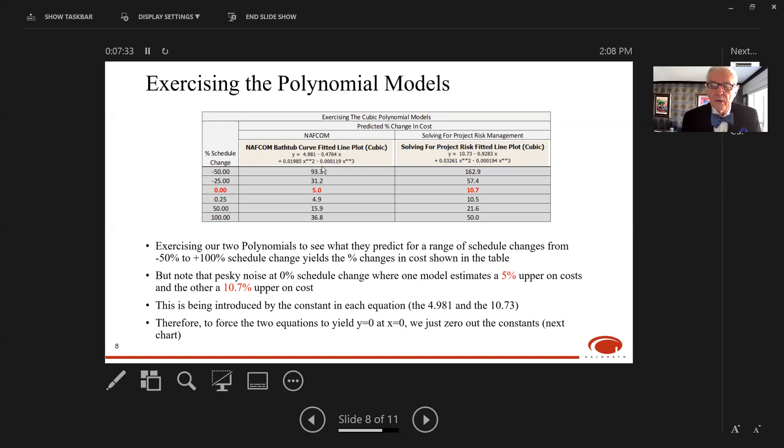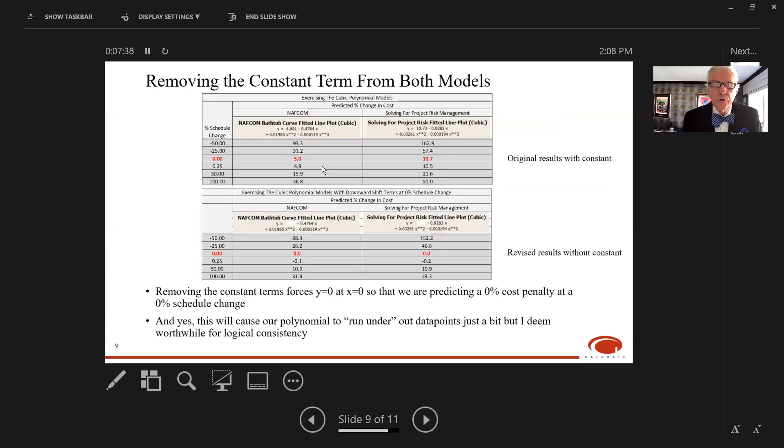Therefore, to force the two equations to yield Y equals zero at X equals zero, we just zero out the constants. The top part of this chart is the same data from before. On the bottom, I've painted over the constant term in both equations. In the Excel spreadsheet, I entered the polynomial without the constant, bringing both curves down by five and 11 percent respectively. Removing the constant forces Y equals zero at X equals zero, predicting zero percent cost penalty at zero percent schedule change. I'll admit this causes our polynomial to run under the data points just a bit, but that's worthwhile for logical consistency.